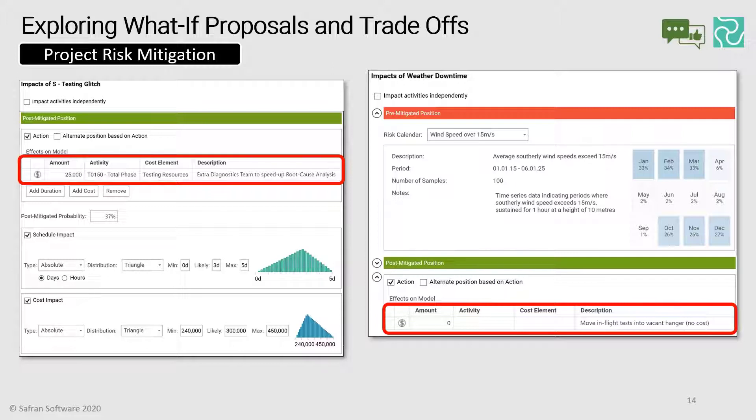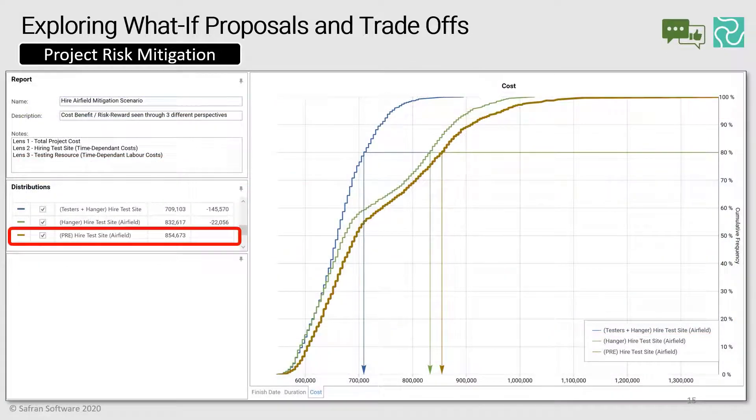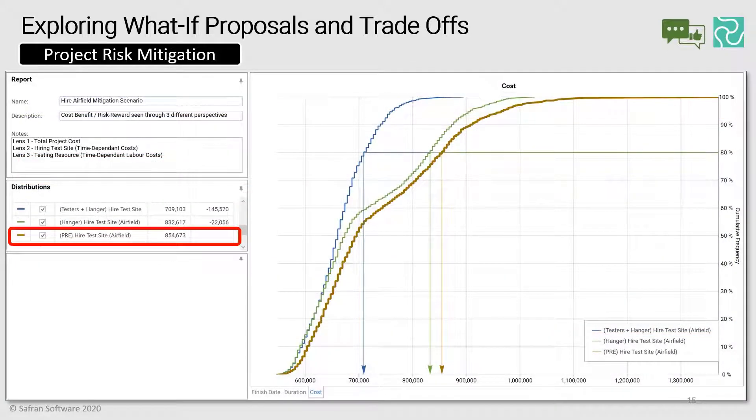Having already run the Monte Carlo simulation to give us a baseline recorded in our distribution comparison report, we can now quickly rerun the Monte Carlo simulation a couple more times where just these risks are deemed mitigated and add their S-curves into the comparison report as well.